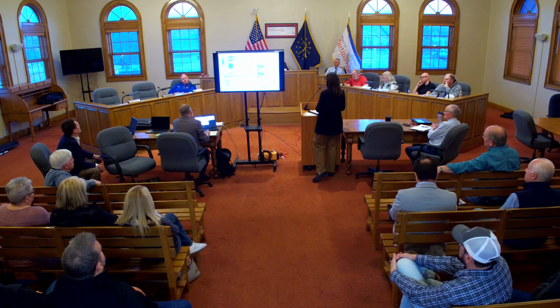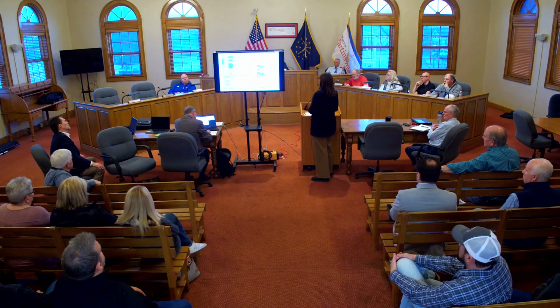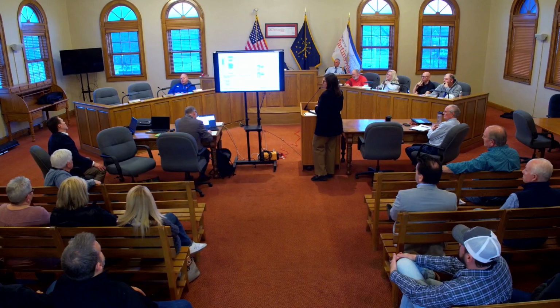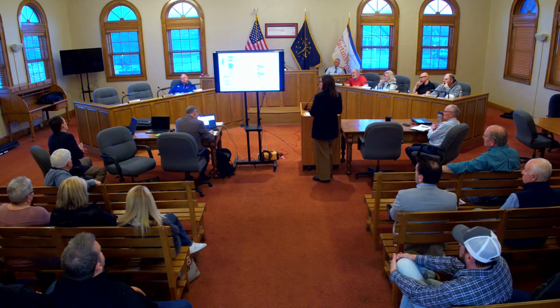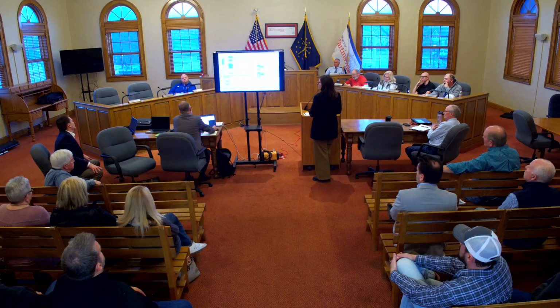How will that affect the structure of City Hall here, the partial basements? Yes, the existing building has to be shored up. Any addition alongside a building, we would be shoring up, and that's something our structural engineers do, but there is some small cost to be able to do that. It's the shoring of the existing building, so yes, there's cost associated with it, and it is doable.